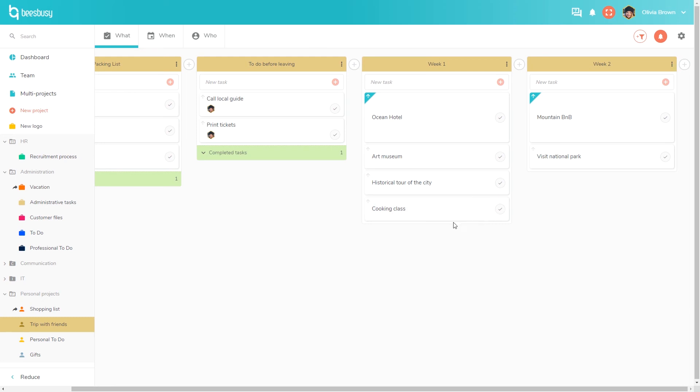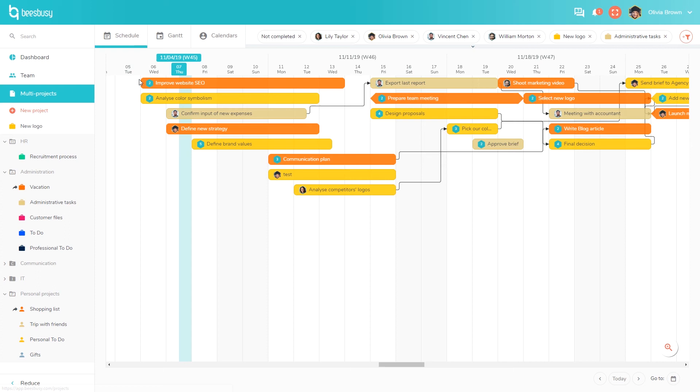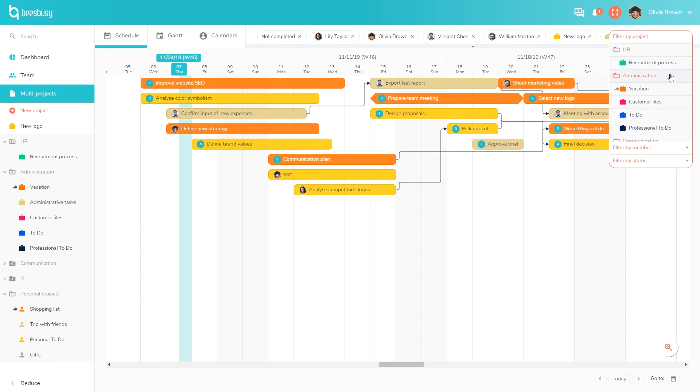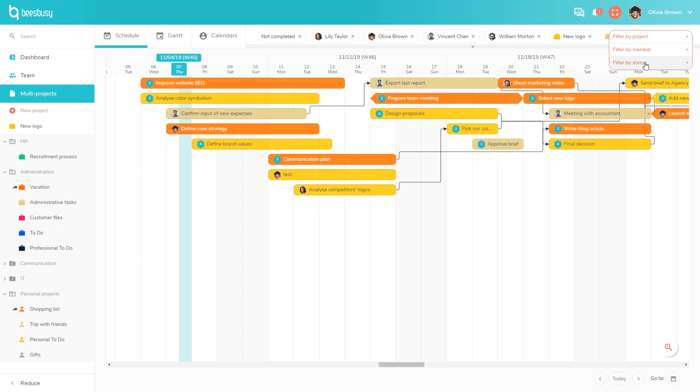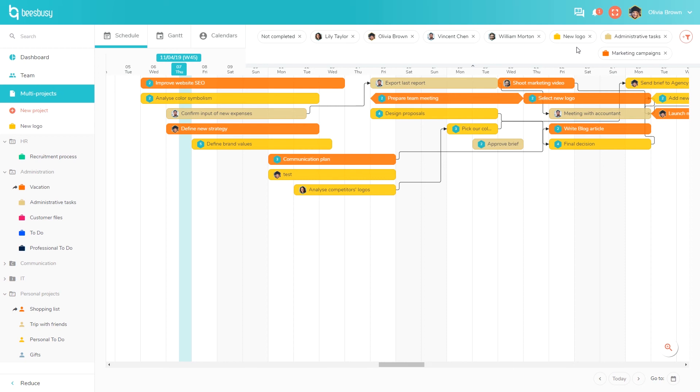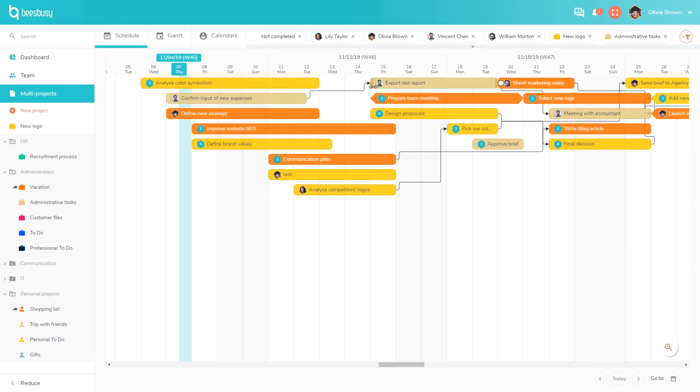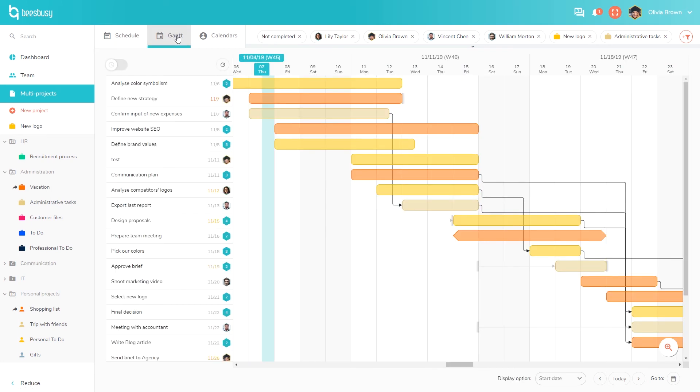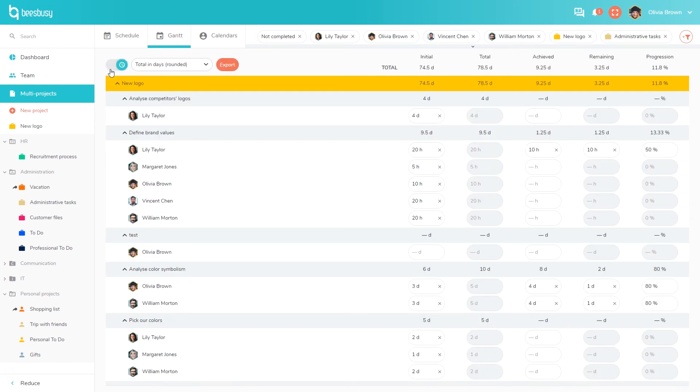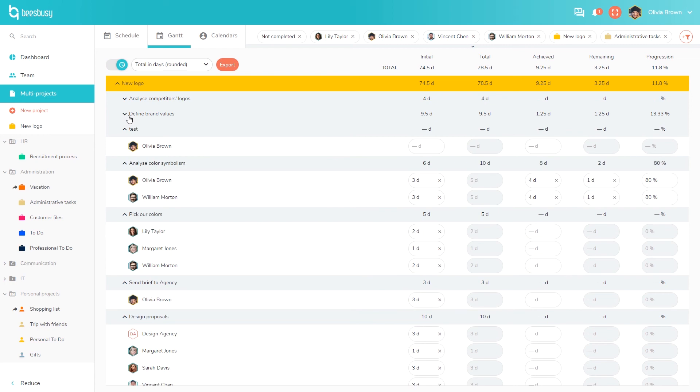When you are managing several projects, you need an overview of everything. And so there is a multi-projects view. On each view you can use filters to select the elements that you want to be displayed. You can choose from different categories. You can select one or more projects or even folders. You can select one or more members and choose task status, like late or completed. Here I selected three projects, four members, and only tasks that are not yet completed. I'll see on this timeline the tasks for my three projects. I can also modify or reschedule a task and see the impact on the whole planning. You can see your tasks here in a multi-projects Gantt chart. By clicking here you can also use the time tracking report. You will see for each project the time spent by your team on the different tasks. You can also export all of this to an Excel sheet.